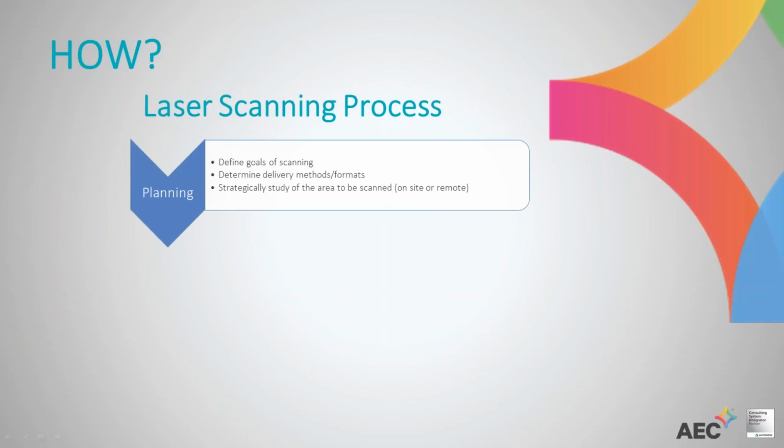So we're going to discuss a little bit about the process of scanning. First of all, and sometimes it's overlooked or underestimated, is the planning. Planning is key to the scanning process because we want to go to the site and scan as few times as possible. We don't want to go back to our offices, finish the processing, and find that we're missing an area, or that the client was hoping that some specific area was properly defined, and we had to go back, right?